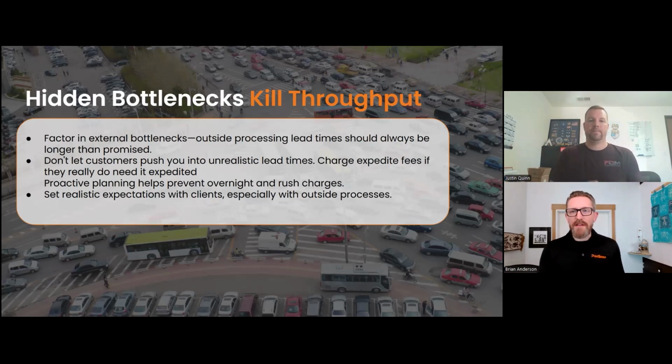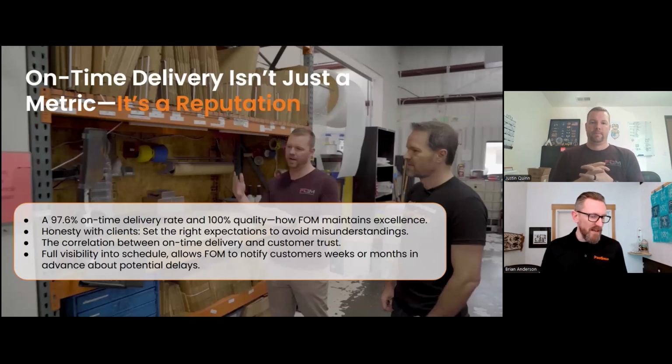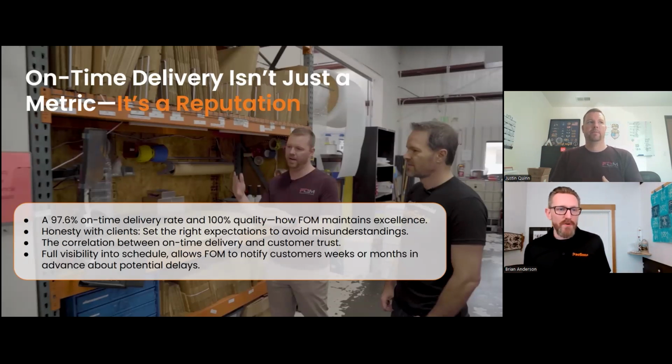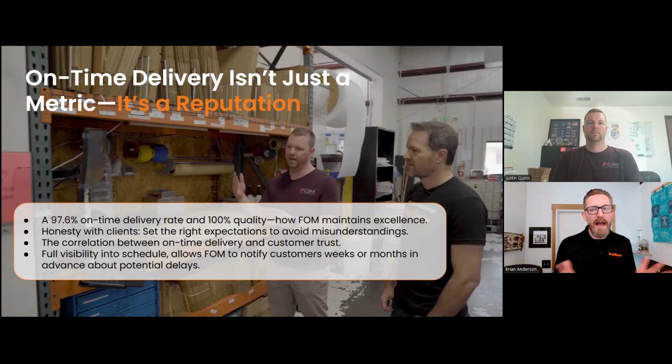And in my scheduling, when I do the product demonstrations, I actually have a scale, a multiplier that I can adjust. If I schedule a resource for 40 hours a week, a full shift, but I realize my throughput is actually more like 30 hours, then I just adjust my efficiency metric to scale that schedule, and then I can see everything based on that. So there's a lot of ways to do that.